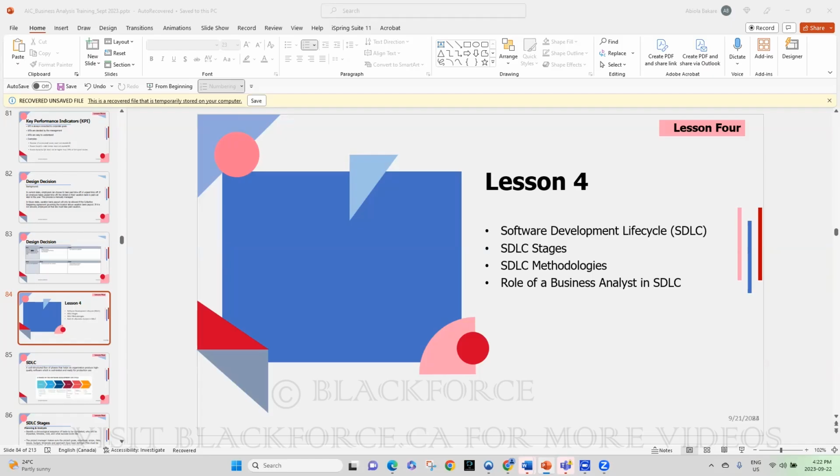Because what they want to change is something that will be used immediately. So it's not like a project we're doing for 5 months and at the end of 5 months, it will go live. If that was the case, we'd just put it in the next sprint and it will get done. This person requesting it would not know the difference anyway, because at the end of the 5 months, we'll deliver the project to them.